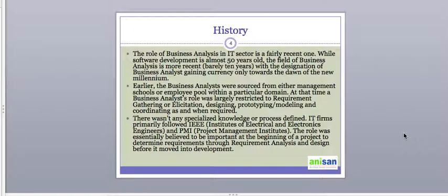And that happened for 3 months, not 3 years. Again, it is 3 months. So the client has reached a very frustrating level. When the project manager was roped in, he happened to be my friend, and he said they have started a concept called MOU, Memorandum of Understanding, so that whatever requirement you give, we will write and send it to you, and when you confirm, then we will provide.